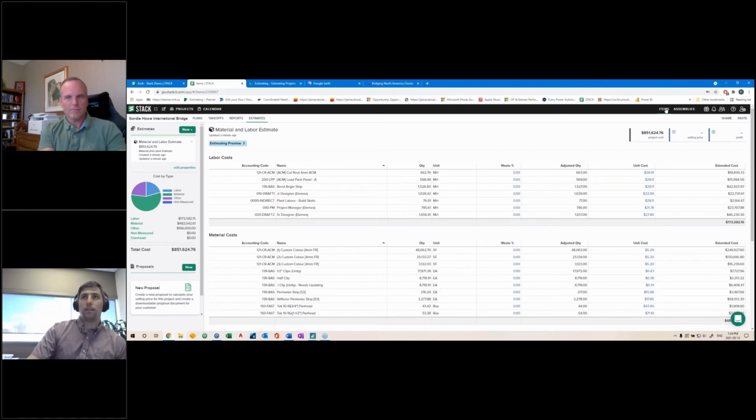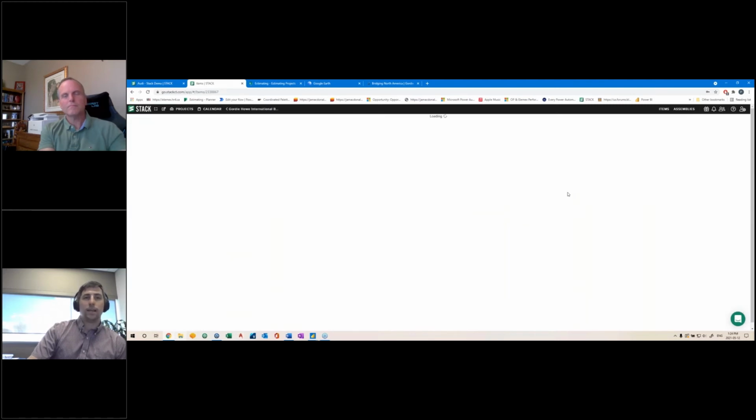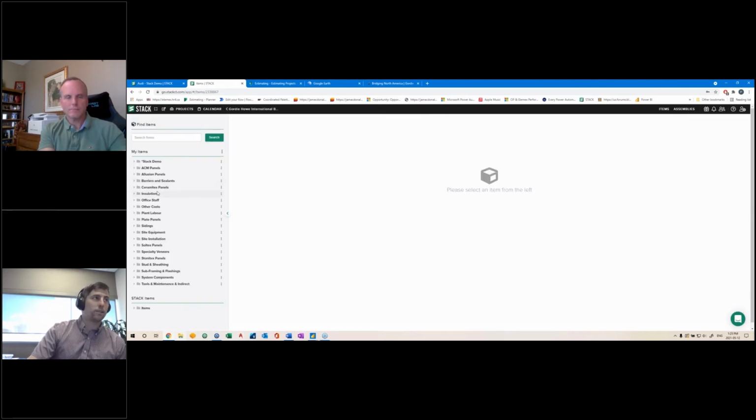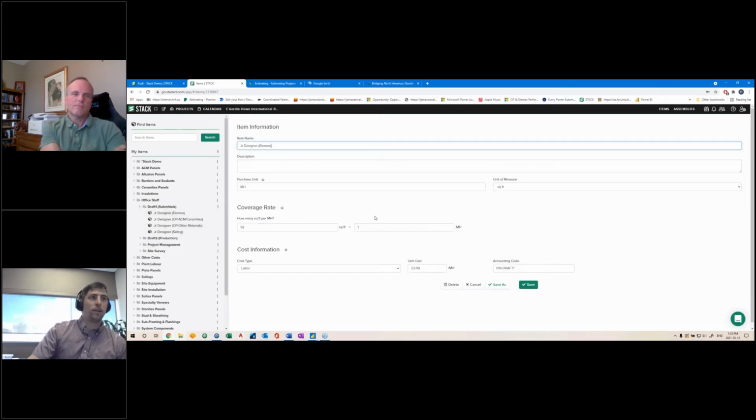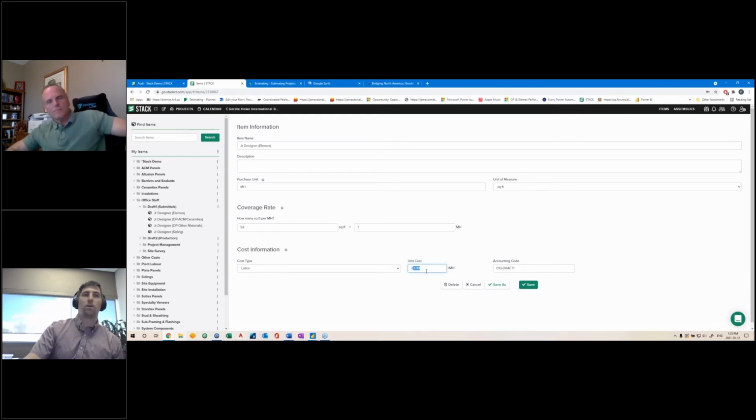I think for me, the biggest thing I would like to see is the history on the costing would be great. One of my only complaints with the software right now is if I change a cost, let's say I was to change a junior designer rate here from 2209 to 2309, it's a new year, we gave them a 2% raise for the year. It's going to impact every single bid unless for some reason I change the price in that bid.